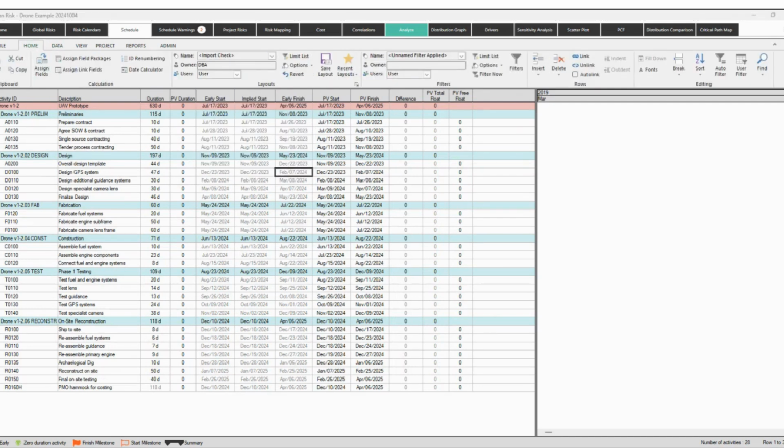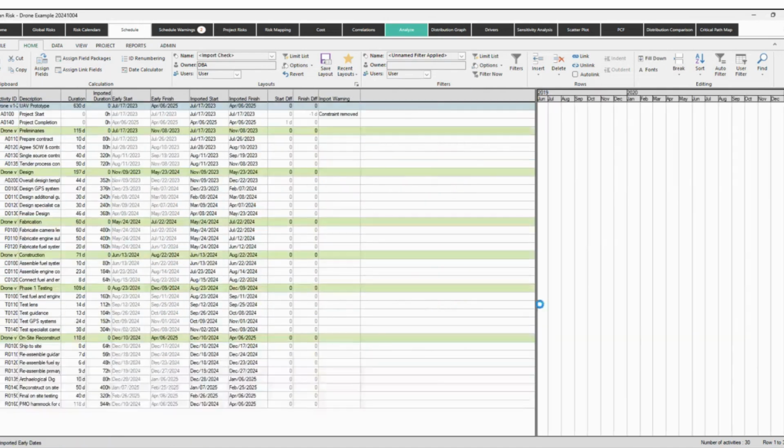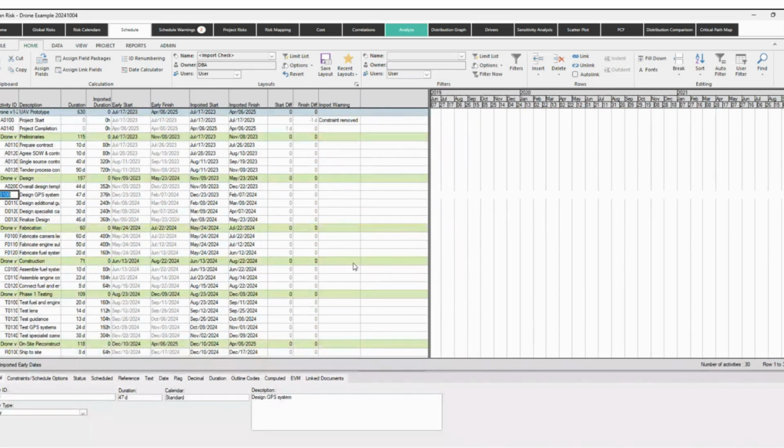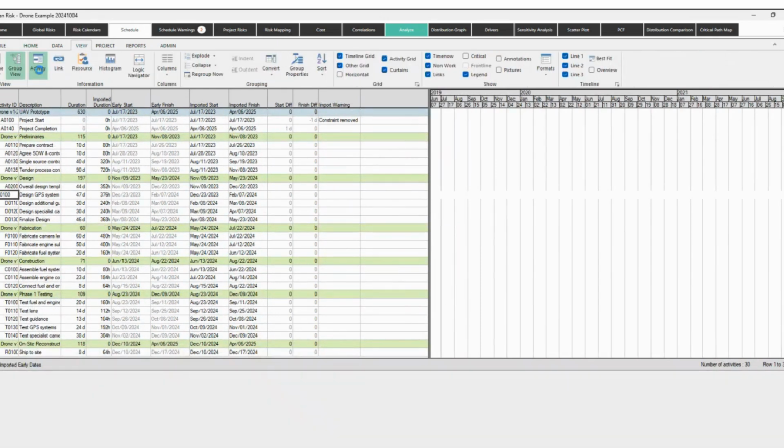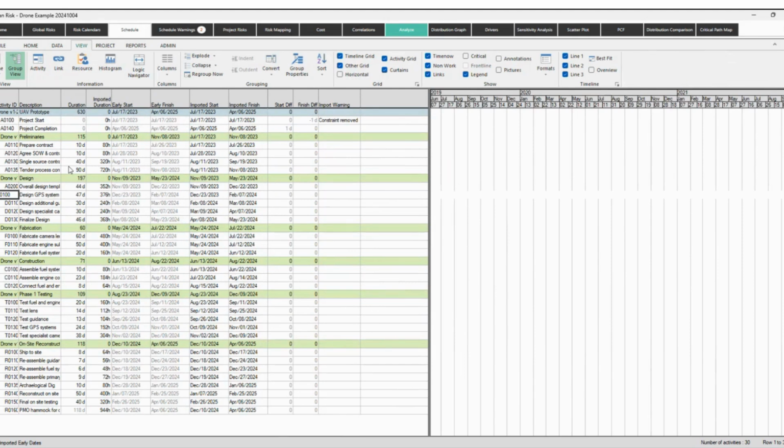I think that this import check was it, right? You have all this logic, and what you want to do is see if you apply the same distribution, the same uncertainty to all the tasks, whether you have 50 or 5,000, the model responds correctly, meaning that you don't have a big disruption, right?